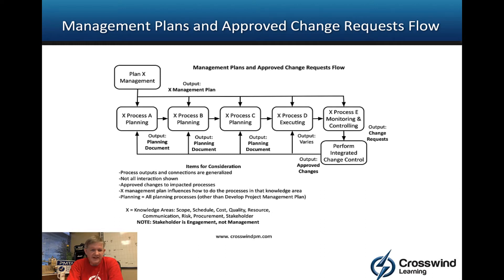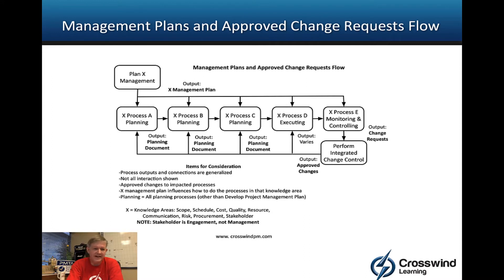If we say the knowledge area is X — that could be scope, schedule, cost, and so on — note that stakeholder is not 'management,' it's 'engagement,' so it would be Plan Stakeholder Engagement, which gives you a Stakeholder Engagement Plan. What's happening here is this is an ITO pattern — an Input, Tool, Technique, Output pattern — that people commonly miss.